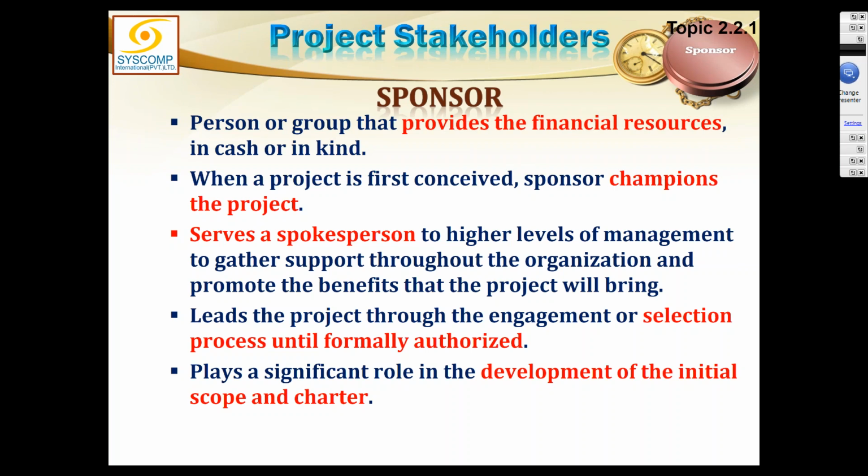If the project is not initiated, everybody who has assigned this project to him would be asking him why the project has not yet started. But as soon as the project charter has been created and given to the project manager, the project manager is responsible for running the project. Naturally, after due permissions from the sponsor, the project manager cannot do anything without the permission of the sponsor, and naturally the project board and the senior management, but this would happen only after the charter has been given.